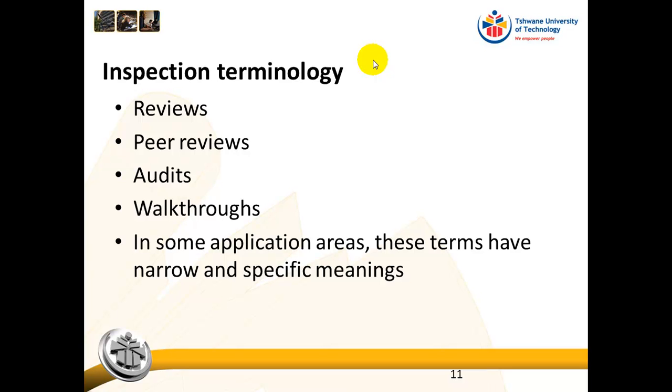So in other words, in software, a walkthrough has the specific meaning of a code walkthrough where you will have more than one software developer sitting and going through the code and checking the quality of the code, making sure that the code is doing what it should be doing, making sure that the code is documented correctly, etc., etc. With reviews, our example previously of the statistical sampling, where we select 10 drawings to review, you can see that that is an inspection.